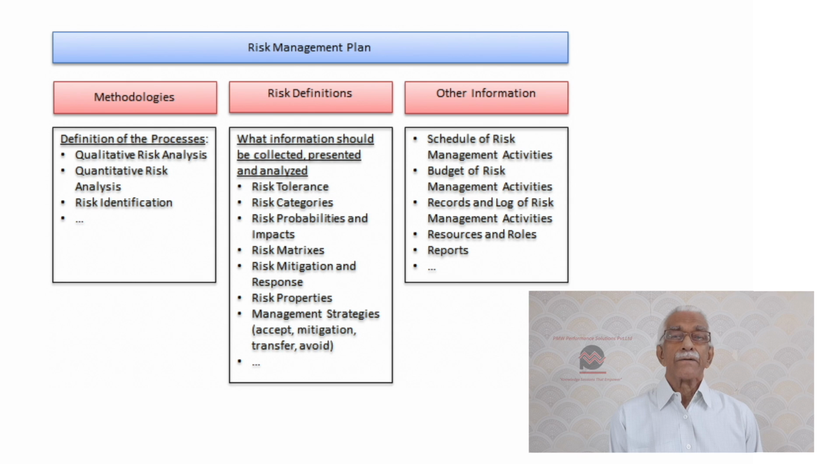Now, the second step is to have a strategy. What will be the level of your risk management effort? If it's a small project, you don't have to go for a quantitative analysis, which we will look at as we go along. A qualitative analysis should suffice.